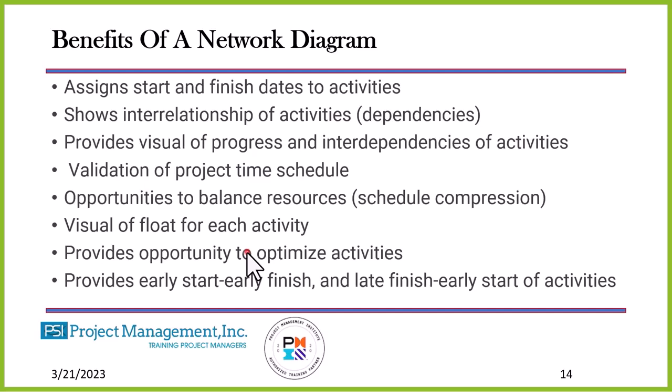The other one is called crashing. Crashing, we just throw more resources on it. Maybe instead of using one paint crew, we use two paint crews. Crashing increases the cost, obviously. And if I'm working on a project that's cost sensitive, that's not something I can do, is it?